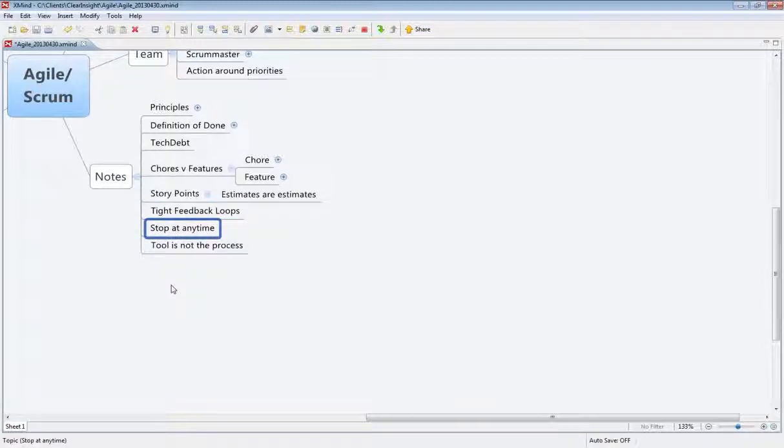Because the next piece is where you can really stop at any time. You hear me talk about sprints. Sprints are just a bucket of time, and I'll gloss over it right now, but think about it as just 2 weeks. At the end of each sprint, at the end of every 2 weeks, we can stop. That's an important point, because in other software projects, you get halfway through a project and you've got something that's not really usable. The only choice is to keep going forward until you get to the end. Whereas Agile has it built into this approach that every 2 weeks, if something happens and you need to release what you've got to this point, you can do that. So it doesn't commit people to being here come hell or high water till the very bitter end. Every 2 weeks, if you see something that's going to be valuable for your users, you can release that.